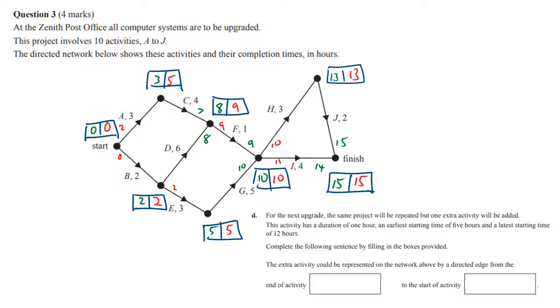For the next upgrade, the same project would be repeated but one extra activity will be added. It has a duration of one hour, EST of five, and an LST of 12. If we look at all our ESTs, which are all the green numbers, can't see any fives anywhere except in one place, and that's coming off the end of E.